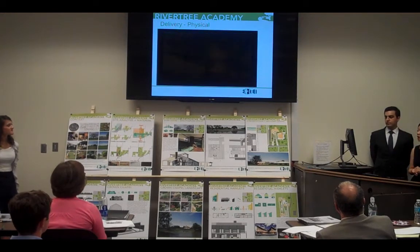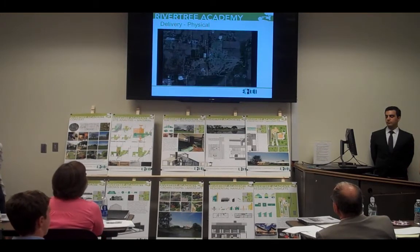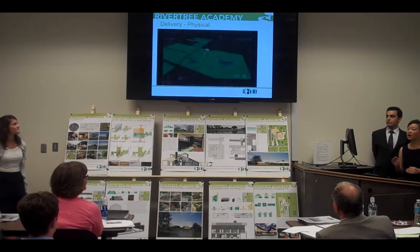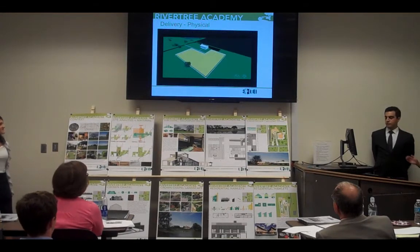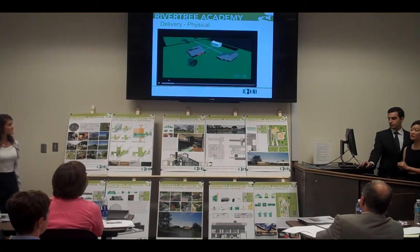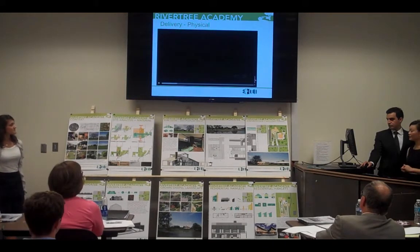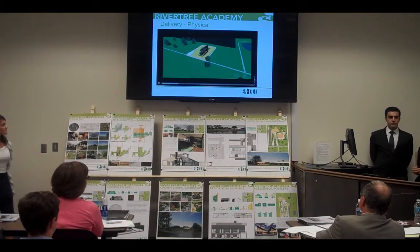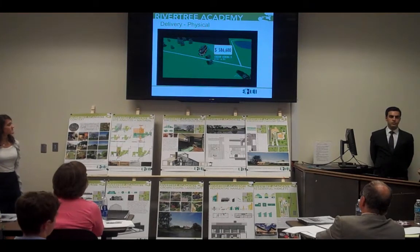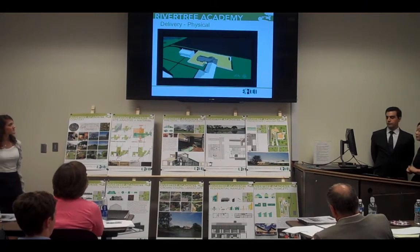The River Tree Academy project is located in the Fort Worth area in Texas. We divide this project into three phases, and in between each phase there is a 200-day gap for fundraising. Phase 1 includes school building phase 1 and the barn being built. At the same time, two residential houses will be delivered for the boys and faculty.